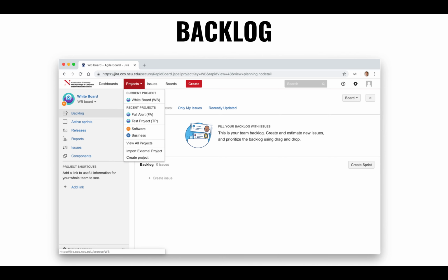sprint. Then during sprint planning, they might ask individual developers, hey, who wants to grab this or that or the other story? And the story might typically only include a title or maybe just a 1-sentence description, right? Very, very vague. But when the developer grabs the story, they're responsible for doing the necessary discussions with the end user, with the product owner, on what it is that we're actually building. And put some details into the story.